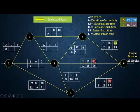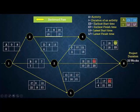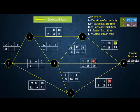Activities E and F each have only one successor, which is I, so their LF = LS of I = 18. LS of E = 18 − 10 = 8. LS of F = 18 − 3 = 15.